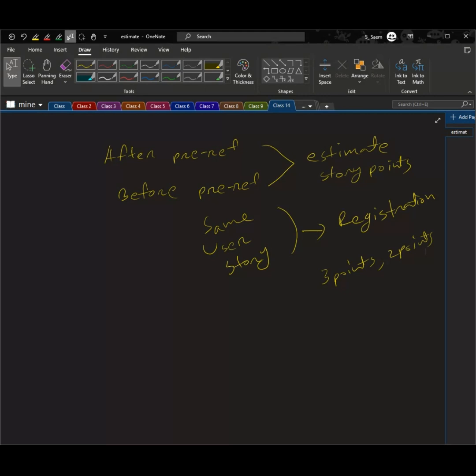So at this stage, the developers and testers do not know who will work on what. The assignments are made later during the sprint planning. The primary goal is to calculate and finalize the effort estimation for the user story. Now, for justification in refinement session, the developers or testers present their estimates during the refinement session and justify the points if needed. Okay.